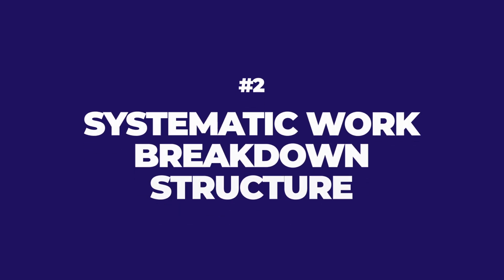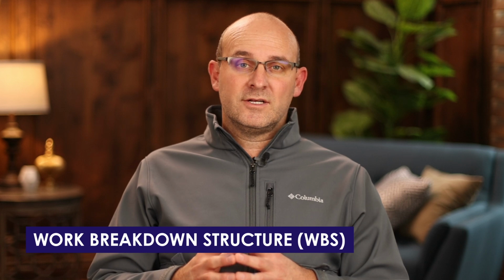Number 3, a systematic work breakdown structure. What this means is that the WBS, or the work breakdown structure that you're familiar with in project management and in CPM, is broken down in a way that work packages can be sequenced and logic tied, and the path of construction can be followed, and everything can install as seamlessly as possible. And then a critical chain is mapped so that we know the path on the project, the path of construction that must be followed. But everything is broken out intelligently so that work packages can be identified and work can be prepared.